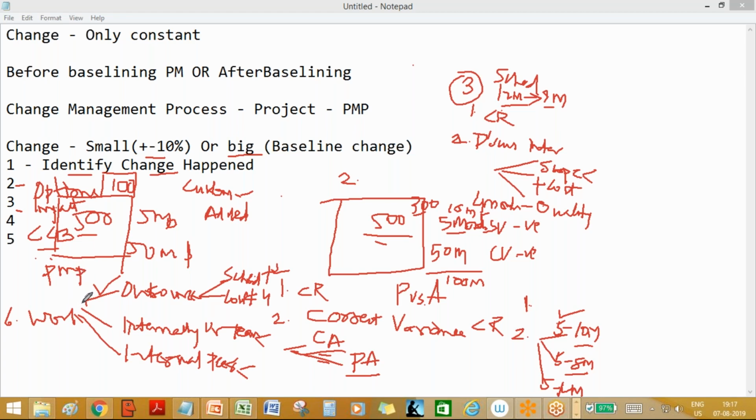The second change is schedule and cost. The project manager is trying, as with that EVM example from yesterday, but he could not achieve it. It is not achievable now. So he found out, let's take that example, 10 days, only 10 features, but $15 spent. Now that $100 is not achievable. So what did he do? He has now revised it from $100 to $150. That is also a change, correct? That EVM was actually a change only, right?